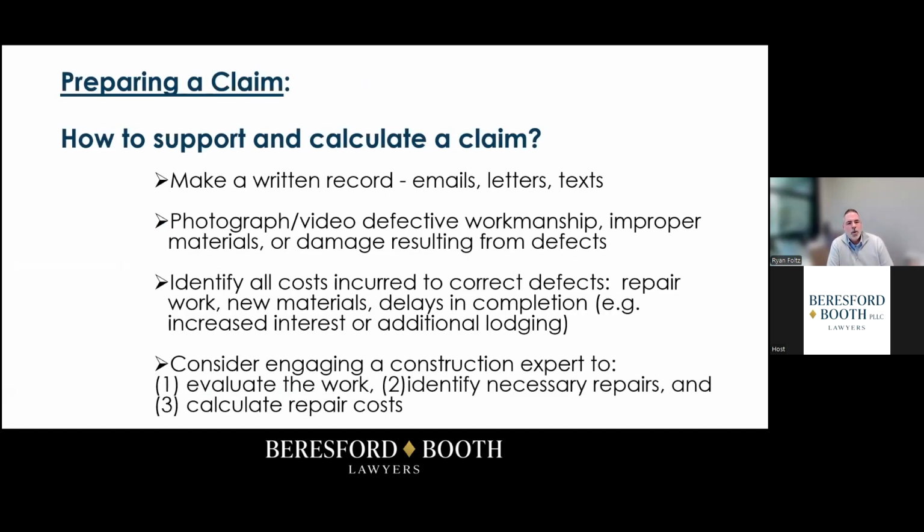If you're not able to resolve a claim directly with the contractor, a claim may be necessary. And so how do we go about supporting and calculating the claim? The best place and the best method to do that is to make a written record of the defective work. So emails, letters, texts, anything that documents and records in real time the work that was defective and any type of damages that were caused or any repairs that are necessary is really critical because in most suits, a year